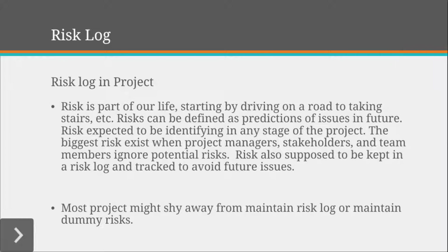Risk log. In many projects we do not see a risk log. We see an issue log but not a risk log. If a risk log is not present in the project, we get many more issues, because risks become issues later on in the project. Management of issues is another story, but maintaining risks before the risk becomes an issue is another thing that projects can do, and they should implement the risk log, and it should be open to all the team members so they can raise a flag that we have a risk coming up.